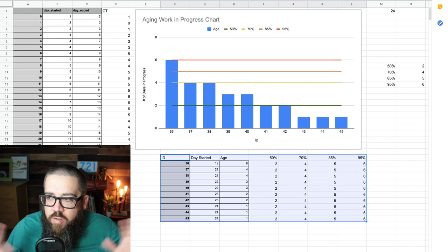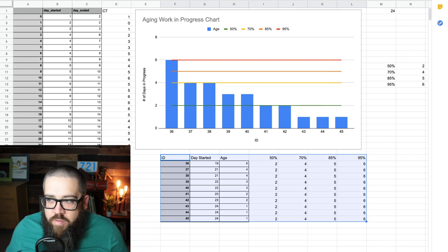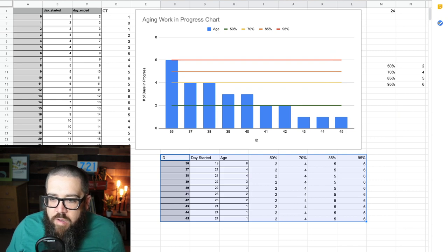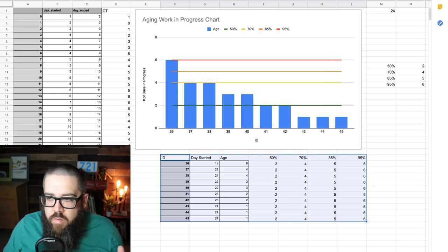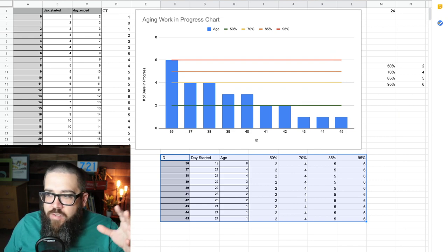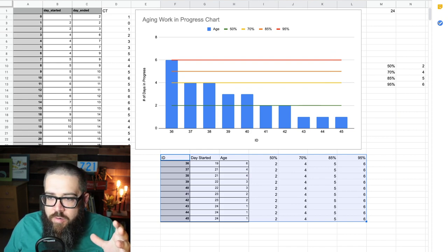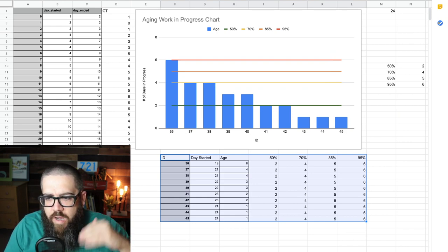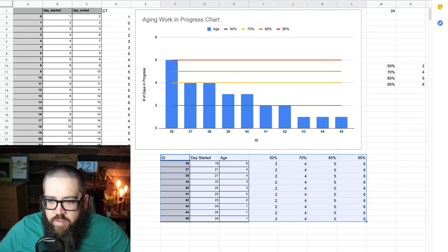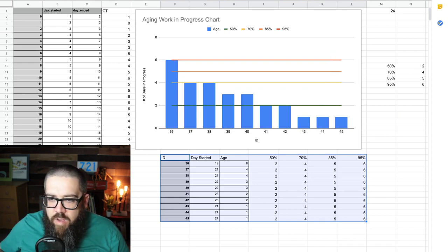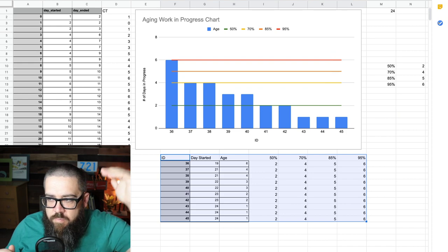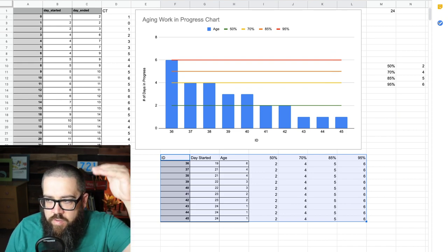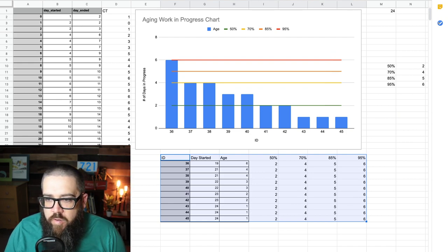So, blue bars alone, aging work in progress is screaming at us. And all we did was take a simple bar chart in Google Sheets, Excel, stickies on the wall, crayon on a cardboard piece of paper. I don't care. All we did was take a bar, the height of how old that thing is. So, item number 36 started on day 19. We're in fictitious land. It's day 25. Bar is six height. Six units high. Six days high. That's the highest bar on there.